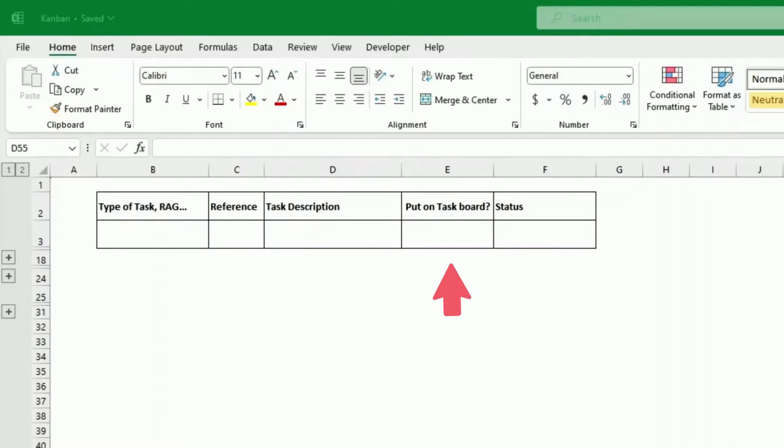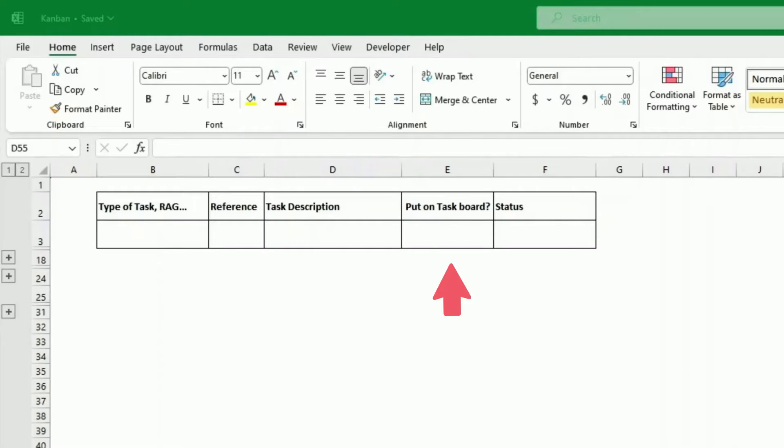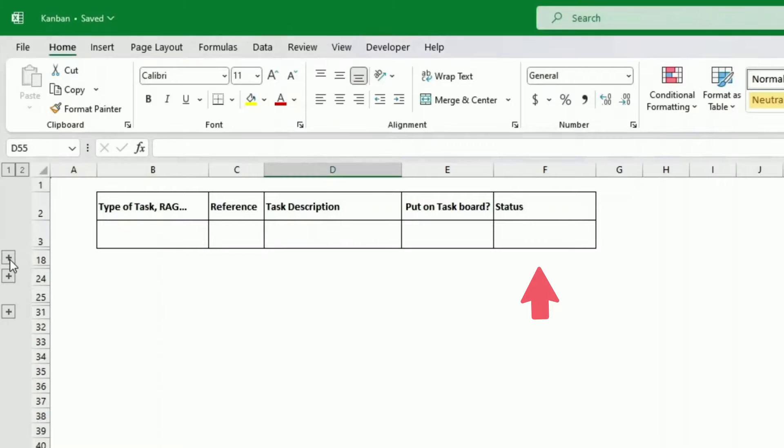A task board or a Kanban is meant to be for quick action for tasks for today, maybe a max of three, five days. So we don't want to drag too many tasks. So the idea is once you have dealt with that task and it's been completed for a while, leave it a few days to let people know it's been completed, but after you can remove it.